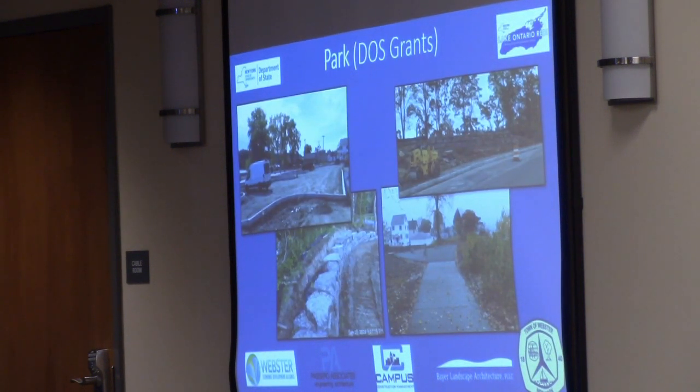The northern parking lot with curbing and stone base in, which, as I mentioned before, has been paved with binder. Then the woodland path has the stone wall curving around it. And the play area also has a stone wall that's facing Lake Road. And then the final picture is the area that the shade structure will go in. There's nice exposed aggregate concrete in that area, and then it ties into the sidewalk.